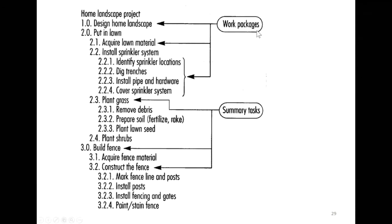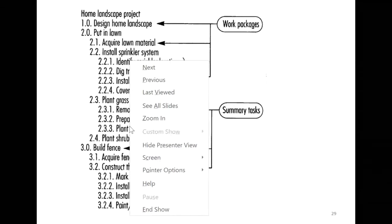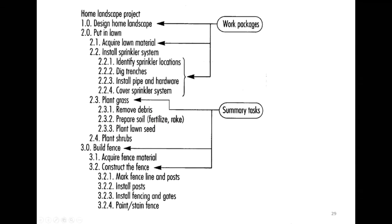Work Breakdown Structure is the initial tool. Before starting work, even for a simple project like home landscaping, you can break it into key tasks. The top-level task is often referred to as a summary task with further breakdown. In our work package, summary tasks include getting the design, landscaping, putting in the lawn — and within that there are sub-tasks — and building the fence. We start planning by looking at higher-level activities.